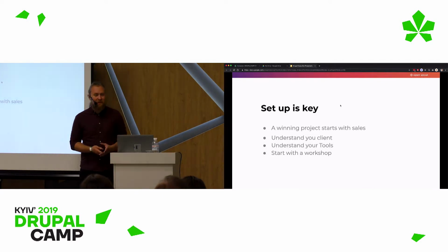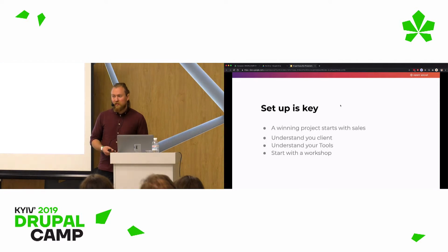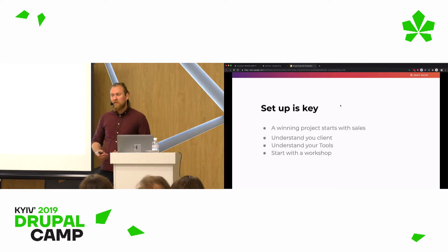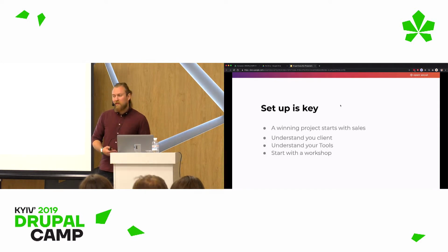A fourth point is something that we just learned from practice, is that a starting workshop to implement this is super important. There you can build a foundation for later moments where you have difficult situations in a project, where you have to make hard calls, where you have to convince them, and a face-to-face workshop is the best way to establish this connection.